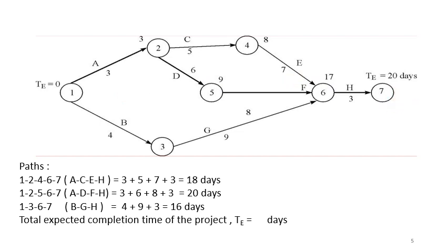This is the start of the project, because you can see here both the activities starting here, that is A and B, don't have any preceding activities, so they become the start activities, and this is the end or the finish of the project. So please remember, the project is complete only when all the activities are completed.